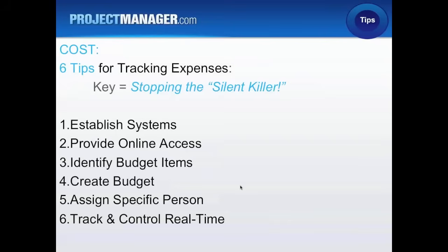The killer is everyone assumes, not everyone, but a lot of people, when I go in and do assessments, the assumption is made that every resource is 100% to that project, and that's no way. So therefore, the person may be working on 4 projects, so each project manager has them 100% on each of the 4 projects. And so maybe they're assigned 40 hours a week on each of the 4 projects, and that's not doable. I mean, everyone loses. The person is set up for failure, and so is the project.